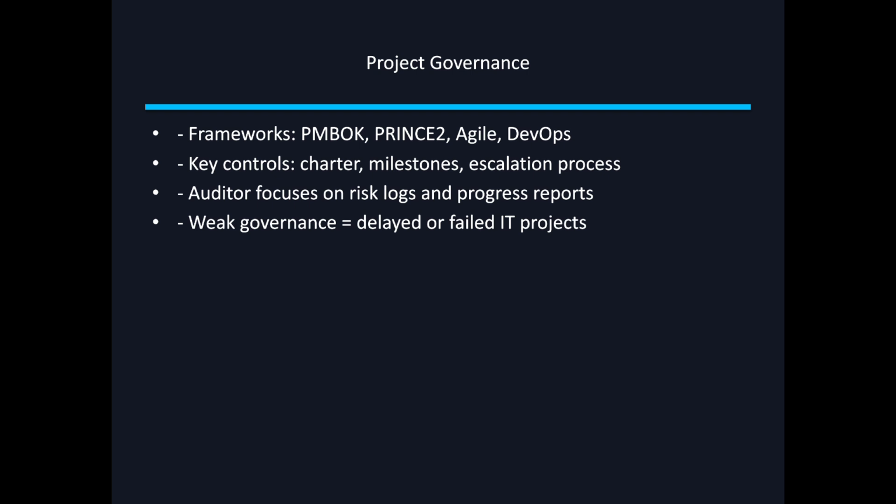So there's an audit case I wanted to discuss in this section. In a government audit, a software project went 11 months over schedule because scope was redefined 3 times without documented approvals. So what does this imply? It implies that weak change control equals delays or governance failure.